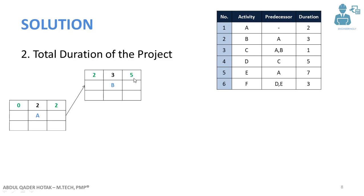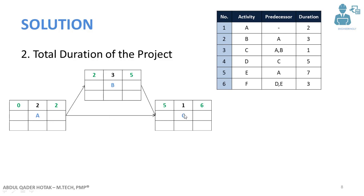Then we have activity C, whose predecessors are activity A and B. The earliest we can start activity C is when both A and B are finished. Activity A ends on day 2, activity B ends on day 5. Since both must be finished, we write the early start as 5. Adding the duration of activity C (which is 1) gives us an early finish of 6 for activity C.